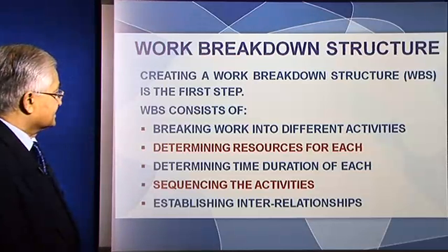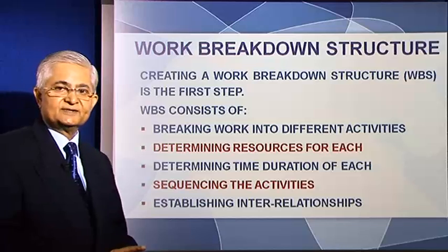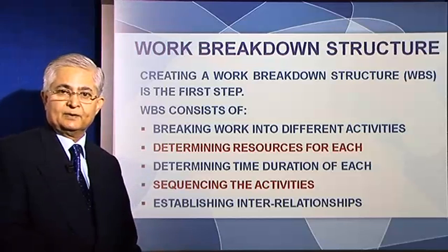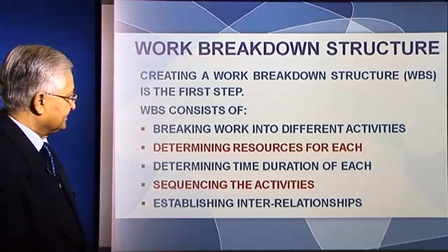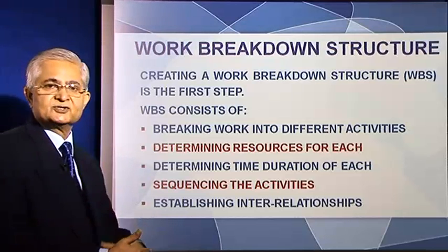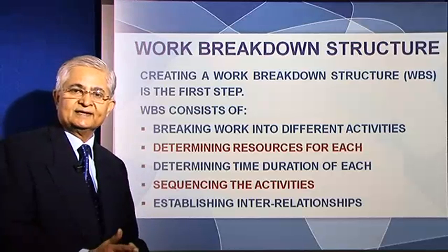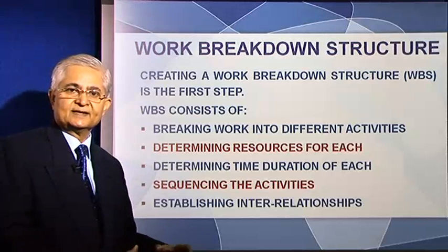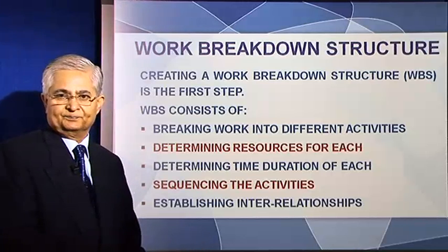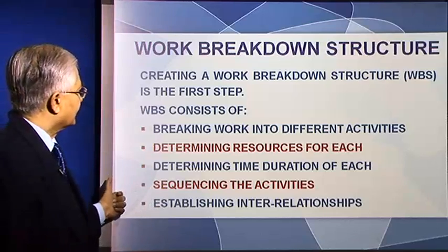Then there is the sequence of activities, meaning which activity comes first and which activity comes thereafter. And finally, there is the question of interrelationship between activities. Certain kinds of activities can start only after certain other activities are over, right? So, this is called the work breakdown structure.